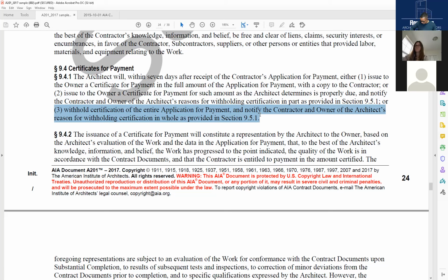Okay, if you find out that the contractor is not paying a subcontractor. How would you actually know about that? Because you're not supposed to talk to the subs, and the subs aren't supposed to talk to you. Well, I think the subcontractor, there is something in the 8201 about them contacting the owner or architect if they're not being paid. Well, you probably might find a claim or a lien on the property, and then that's how you probably will find out, like a letter saying there's a lien being placed because the subs aren't being paid. You will know about that.